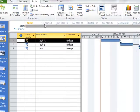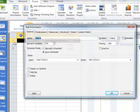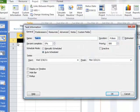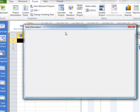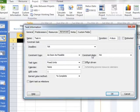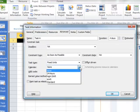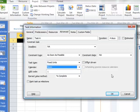We can apply calendars to an entire project. We can also apply them to a particular task, so we can come under Advanced here, and we can actually give it a particular calendar that we would like to apply just for this specific task.